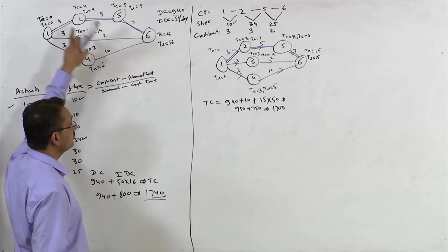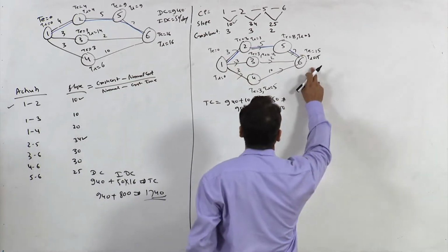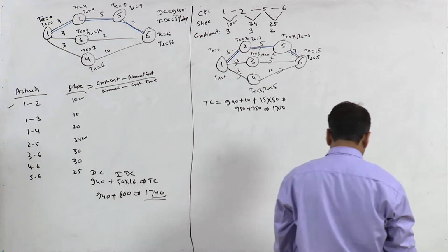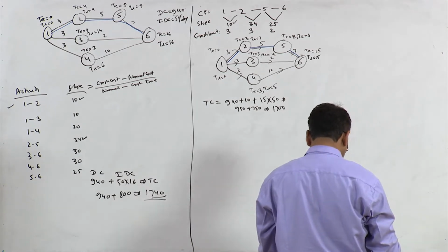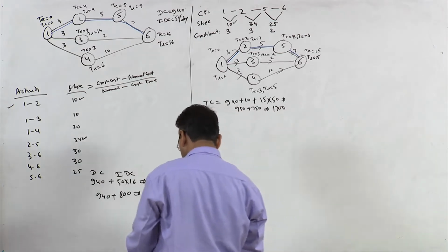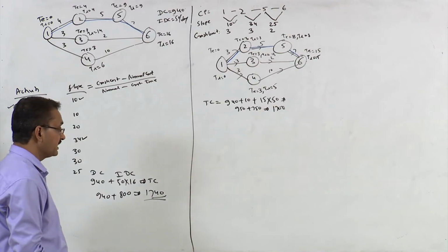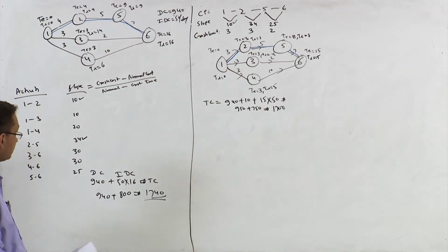from 4 to 3 days, and now the total duration is 15 days. So the total cost would be what? Here it is 1700. Now let us look at what to do next.